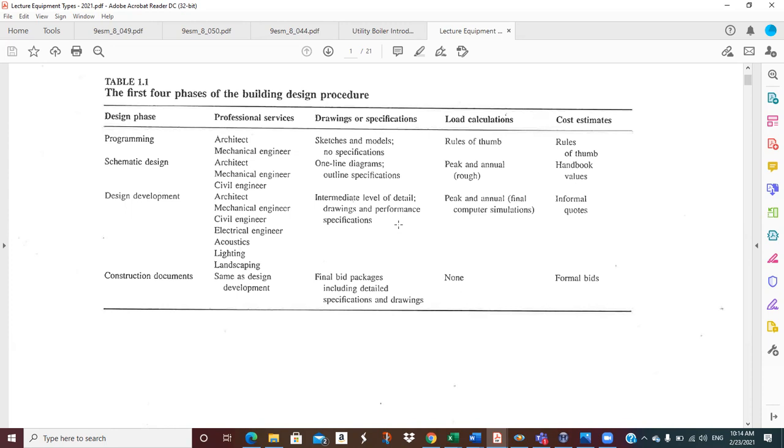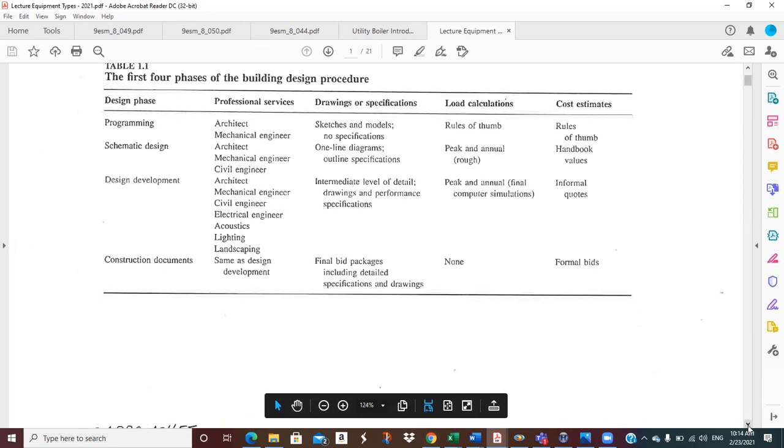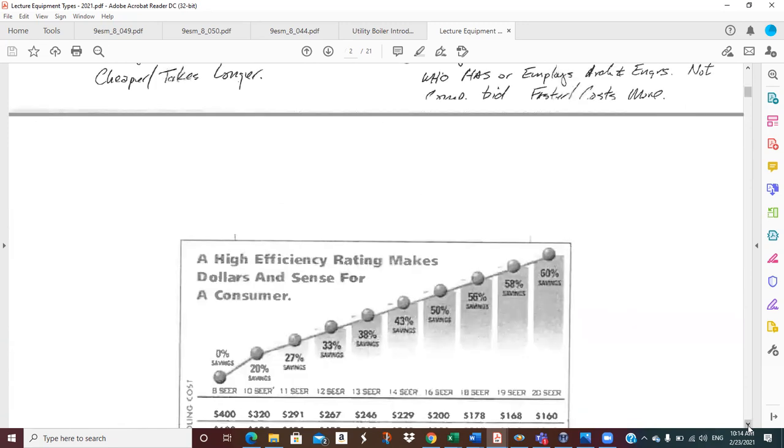So with design build, the main relationship is between the owner and the general contractor. It goes quicker, and it usually costs more money because there's not as much competition in the bid process. The more traditional sequence, where the owner goes to the architect, takes longer, but you usually get a better price if you want to take it. Okay, so that's enough of me droning on about that. Let's move on. We're going to move more quickly, but that's important information for guys coming out to have some kind of an idea.